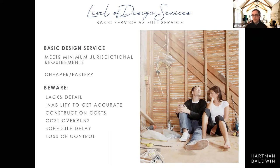When you hear things like basic design services, I hear other people call it a permit set or a builder set. What that means is you're going to get a set of drawings that's going to allow you to go and get a permit. Simple as that. It's just going to meet those jurisdictional requirements. It's not going to have the detail that's going to describe to you what the project's going to look like, or, even scarier, describe to the person that's building it what it's going to look like. It's going to have a bunch of blanks. And somewhere along the line, someone's going to have to fill in those blanks.